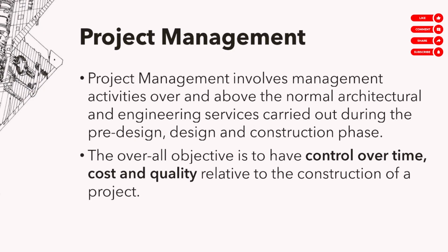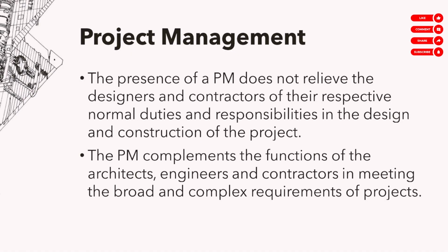Okay. Project management involves management activities over and above normal architectural services. The overall objective is to have control over time, cost, and quality. Okay. Pero just because there's a PM doesn't mean that the designers are relieved of their duties. Kanya-kanya pa rin yan kung sino yung kinuha consultant for the pre-design service, for the regular design service. Kanya-kanyang liability yan. No? The PM just complements them, doesn't replace them. The PM does not parang become liable for their liability. Kanya-kanyang liability pa rin sila.